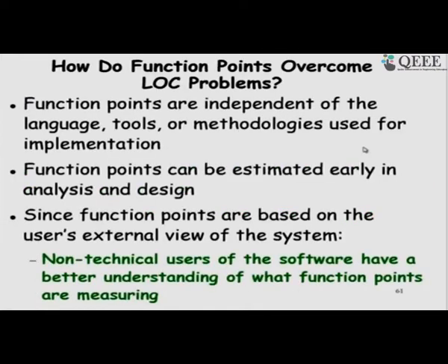It overcame the identified problems of lines of code. For example, with lines of code, you would have to think of which language is being used, because the number of lines of code would vary widely, whether it is C, assembly language, machine language, Java, etc. That would unnecessarily complicate things, and the biggest problem possibly was that lines of code had to be guessed.